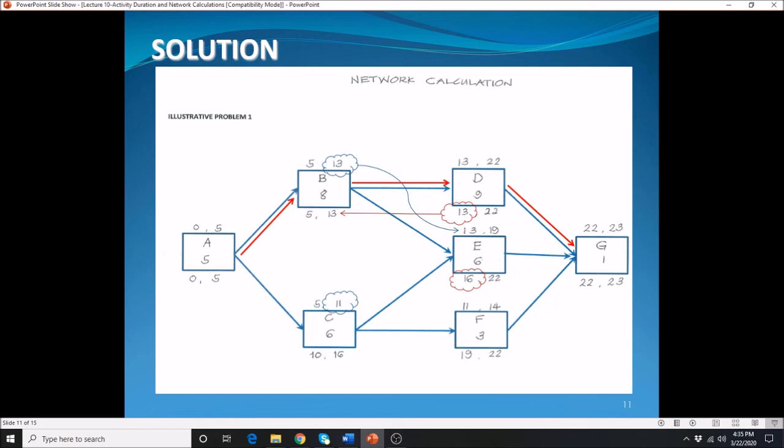Why is this very important? For most projects, there is always a clause in the contract that if you are not able to complete the project in the agreed duration, you are subjected to a given penalty. And what is that penalty that we call in the construction industry? We call it LD, or liquidated damages. And that is one thing that we don't want at the end, because that may drain the profit, or it may drain the cash of your company. Okay, so again, as a project manager, those are things that you need to watch out for.